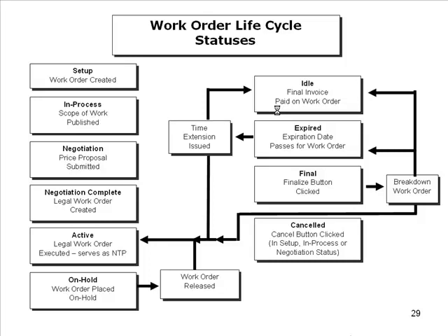Once it's submitted, the status will change to negotiation. Once the legal work order has been created, the status will change to negotiation complete. Once the legal work order has been executed, that serves as the notice to proceed to the consultant. The status will change to active.